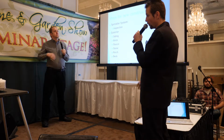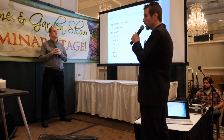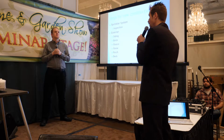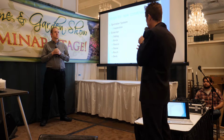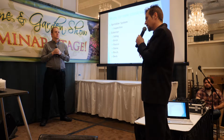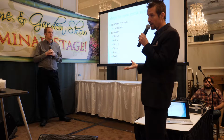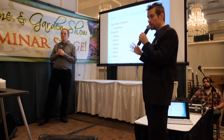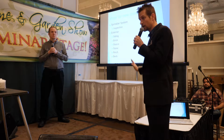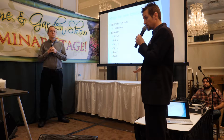After that, we would do a sprinkler system. A lot of cities in the Chicagoland area require sprinkler systems, like Glen Ellen, even Matson, of all places, requires sprinklers. There's many areas that are going to require a sprinkler system. In Chicago, if it's residential, sprinklers aren't required unless you have a rooftop deck. If you have a rooftop deck, immediately the city is going to either require you to do an exterior staircase, which goes up to the rooftop deck, or a sprinkler system.